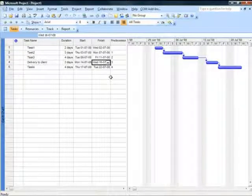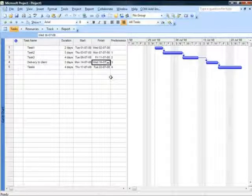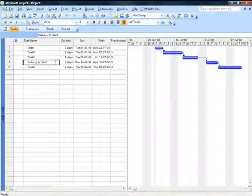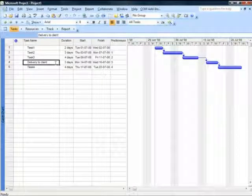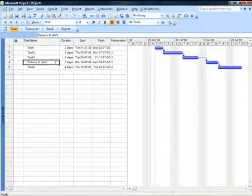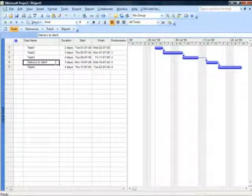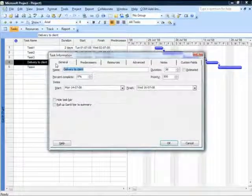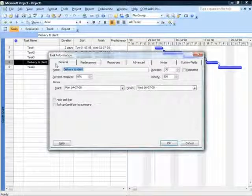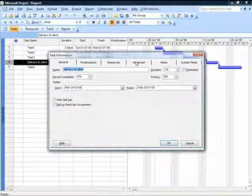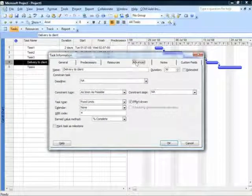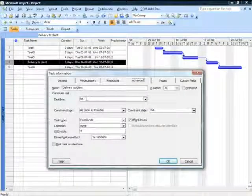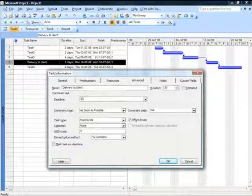I want to be rest assured that no matter what happens to the predecessor activities, this activity of delivering something to the client should be completed by 16th July. So I double click on this task and move on to the advanced page, and I mark a deadline date of 16th July 2008.